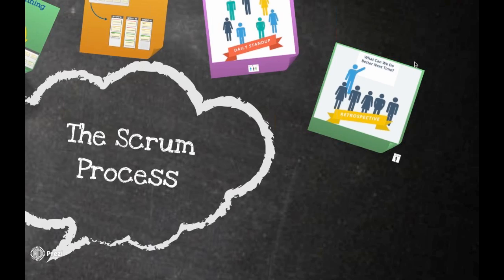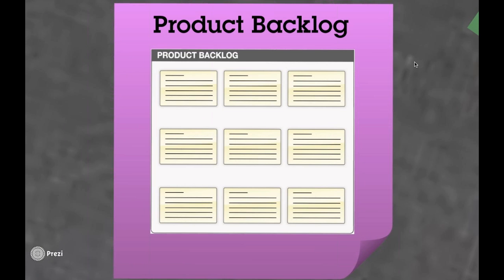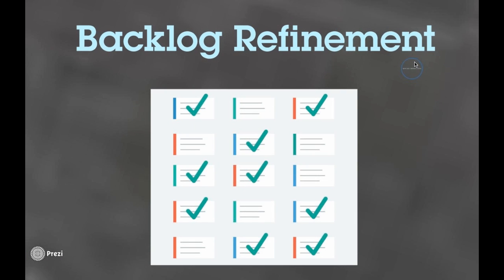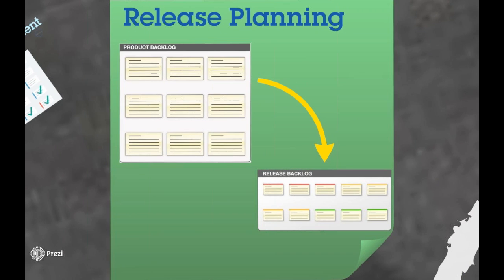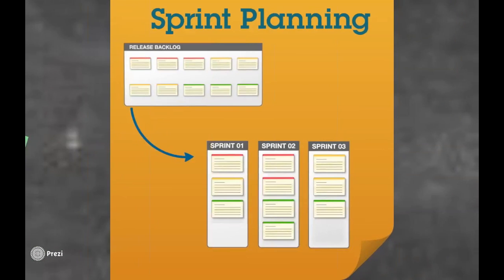So this is what a sprint cycle will look like from beginning to end. Before the sprint even begins, you start with your product backlog, and you're managing all your product backlog items, mainly through the product owner. The product owner will rank all the items, add detail, collect feedback from customers and the team itself. Once the backlog has been ranked and you're ready to start your release or your sprint, you have the planning meetings. That's when you decide what will get done and how it will get done. Remember, release planning meetings and sprint planning meetings in particular, usually last an hour for each week in the sprint.